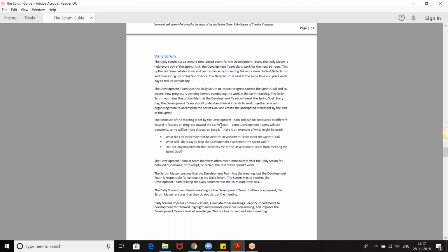So these kinds of things we were able to address in daily scrum because each person used to tell what they are doing. When they did that, the other person could figure out, saying, hey, yeah, this is something that I need from you. So they were able to be open to each other and say I need this from you and I need this from you. Stuff like that. You get what I'm saying? Because this was not there, they had no room for understanding what one person needs from the other and what they are doing as a team, whether they will be able to deliver things. So they ran into such problems.